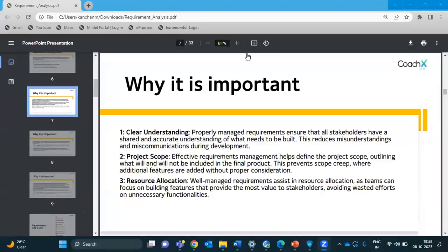So what you will do is go back and write in the project scope, maybe on this date 5 additional functionalities were requested, and the initial timelines would get extended, and the reason why. Because tomorrow if your heads ask you why initially you said the team would be available after 1 month, and now you're saying they would be available after 2 months, I already had a different project planned for them.